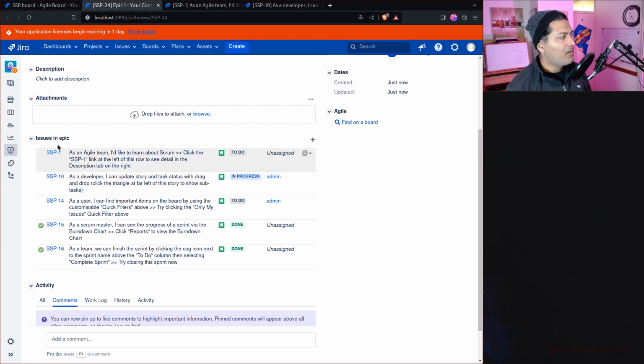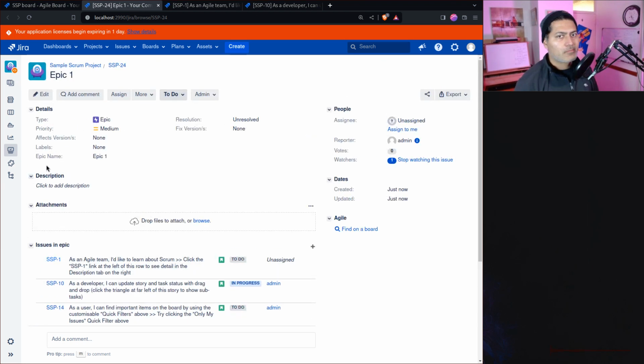Just displaying a field on the epic, like total story points, is probably better. I have not really done any profiling, so I can't give you any numbers. But when you have this field at the epic level, the scripted field will display the total number whenever you are viewing the epic, right? Or usually there is a reindex that happens that will of course update the field for you. But that is of course another option.